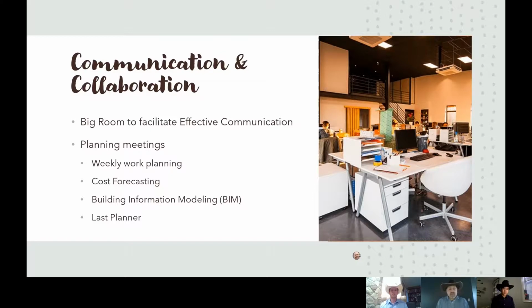So you're going to have all of your planning meetings there, like all your construction activities for the following week or the previous week. You could be going over how much percent complete you are on a particular project and all the different phases. Well-defined commitments are also tracked by the area and the company that's doing the work, the subcontractor. You'll also be doing some cost forecasting in there as well, and you'll be hopefully using some good